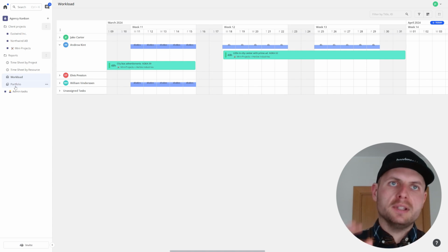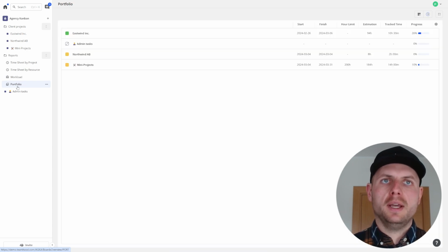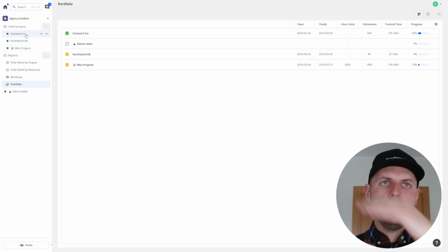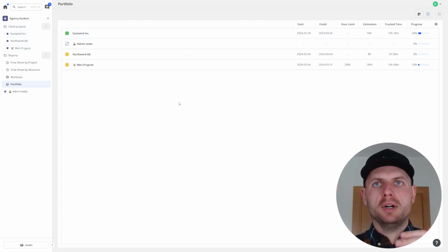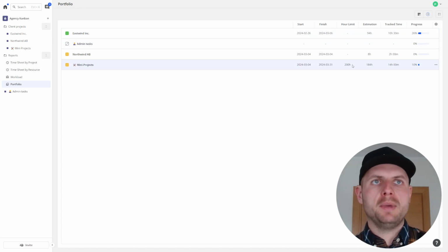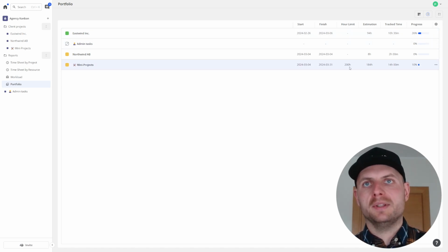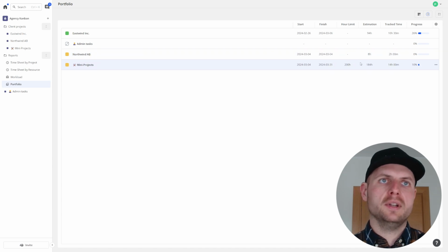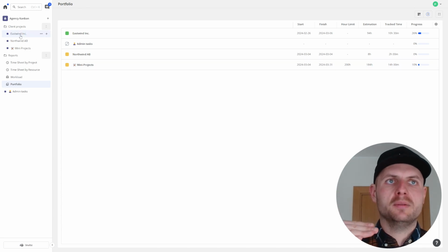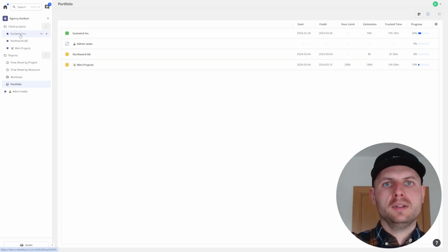And the last thing, really the last thing I want to show you, again, is a high-level overview of all your boards. Each Kanban board can be a project or a set of deliverables, and then it needs to be grouped in the grand totals. You know, what's the total progress? How much time have we estimated? Is there any limit? I don't know if you noticed, but in the first part of the video, in some of the rows, you might have seen limits. So it means how many hours we agreed with the client for the projects, and we should keep track of that as well. So this is super convenient.